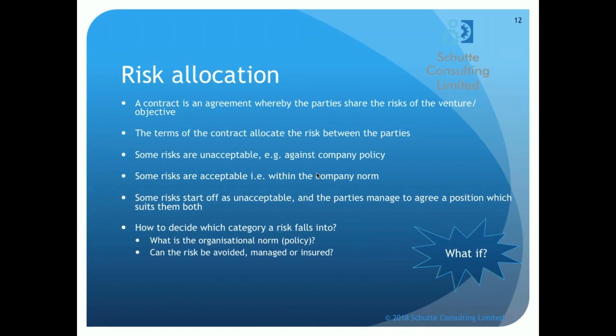Can the risk be avoided? Can it be managed in some way? If we can't avoid it, then we have to manage it. And if we have to manage it, can we manage it ourselves, or do we need to get the cushion of insurance to manage it? Which party is actually best placed to do that? Which party is best placed to manage the risk? And have a think also, if you flip that on its head, what's your exposure going to be if you take on a risk, but it isn't managed well, and it's not insured.